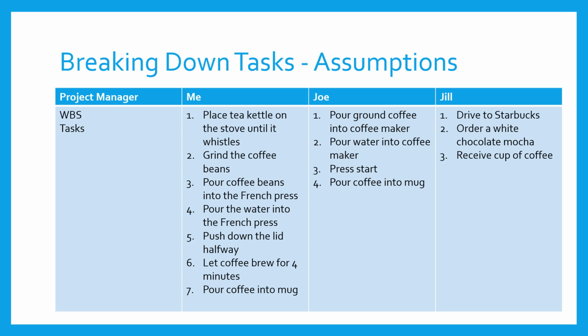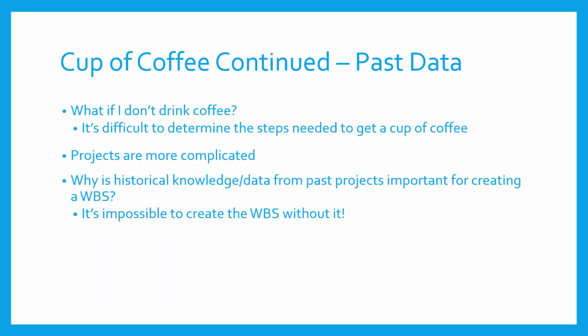In addition, once we have the high-level tasks, how detailed do we want those tasks to be? There isn't a standard stopping point, but ideally you don't want to go into extreme detail because you'll be spending all of your time tracking tasks instead of actually completing the project. Finally, it's impossible to create a meaningful WBS without historical data.